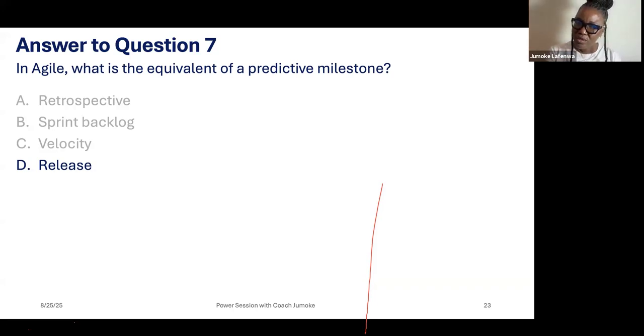So they do the iterations. And so you ask, how would they know they have ended an iteration? You have a definition of done. As you are starting an iteration, the team would determine with the product owner and the customer that once we are able to do this, we are done.